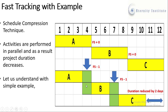In the panel below we have activities A, B, and C where all three activities are fast-tracked. We did the fast tracking by adding a one-day lead to the activity relationships — for example, finish-to-start minus one. As a result, Activity B is advanced by one day and Activity C is also advanced by one day.